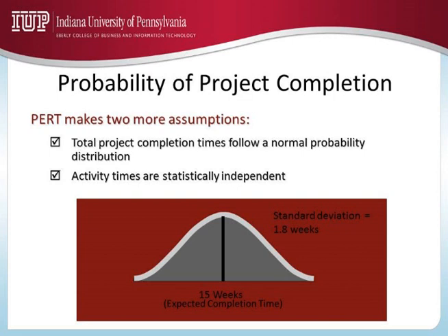So practically here, the project will take anywhere between 15 minus 3 times 1.8 to 15 plus 3 times 1.8 weeks 99.74% of the times.